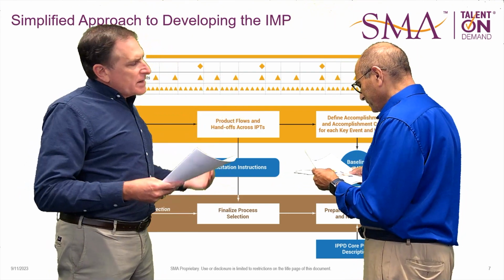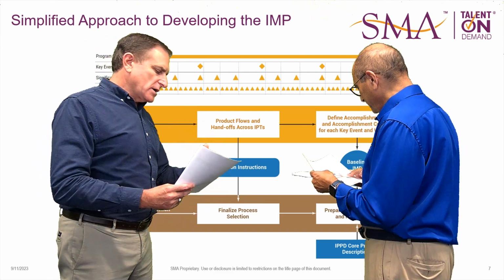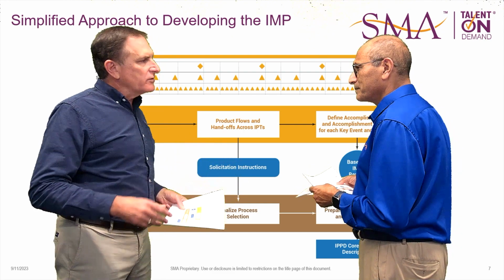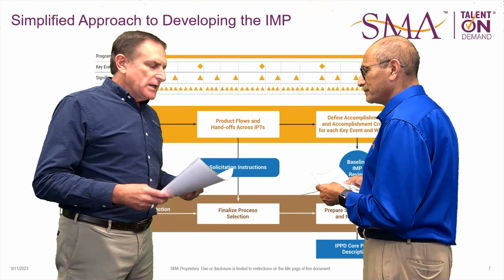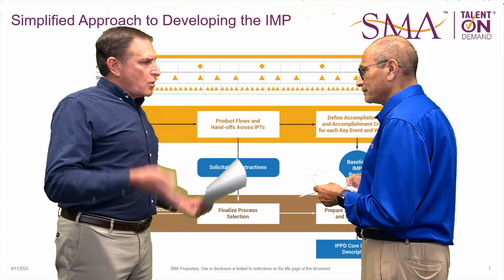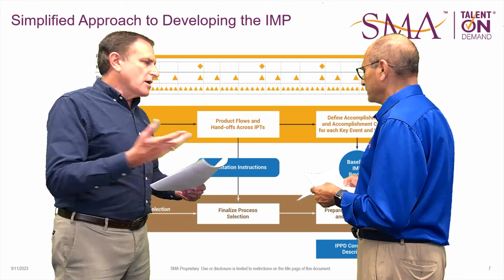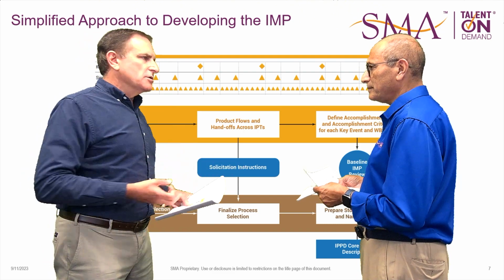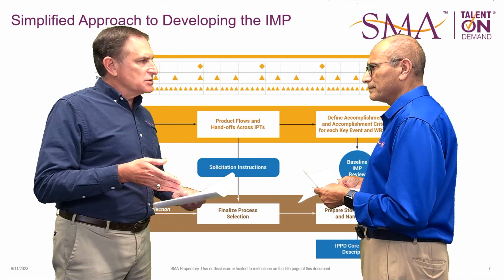And then from there we get into our breakdown of tasks and the IMS, your control accounts or work packages and those types of things, and it all breaks down into that. Now the thing about the IMP itself is that you've identified all of the requirements, and you now need to align those requirements to these accomplishment criteria, and also align where your risk occurs and when you're going to mitigate risk associated with these things.